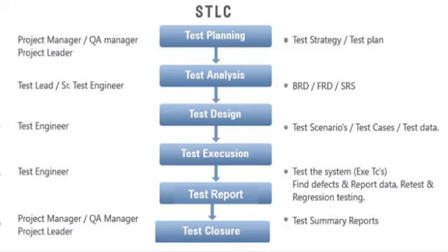After that, the next phase is test plan. In this phase, the team lead will develop the test plan. Here, test plan is a document which defines a plan to test the application under test. Most of the companies will follow the IEEE 829 standard for test plan format.